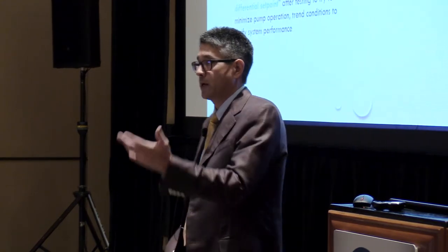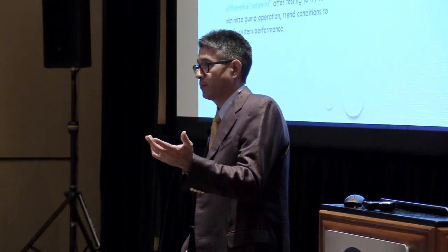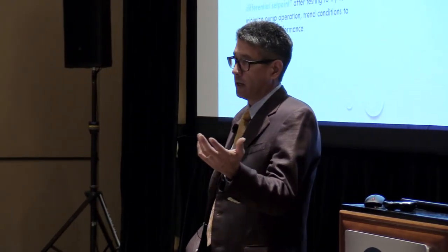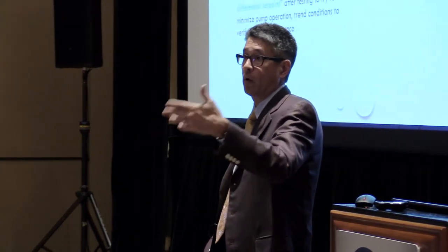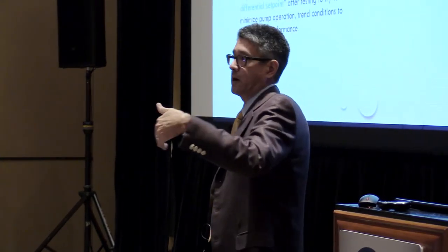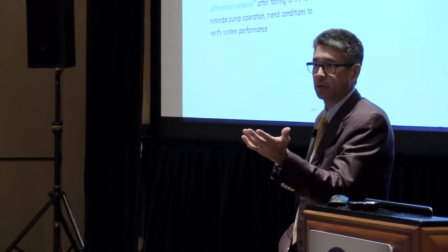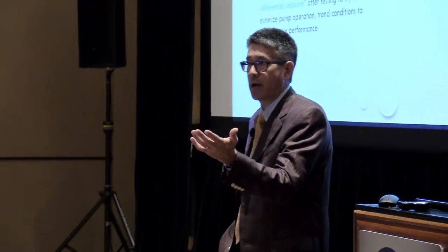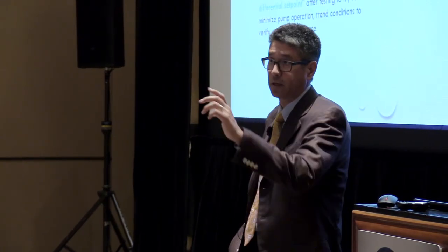Great comment about using that procedure in your testing and balancing plan, and where does that fit in the project? I like it to fit in early on in the design phase. However, once we get a contract, typically, everybody pretty much submits a submittal for their agency on the job, and in that submittal should be the testing and balancing plan that lists how you are going to approach that system. So, I think it's a specification step.